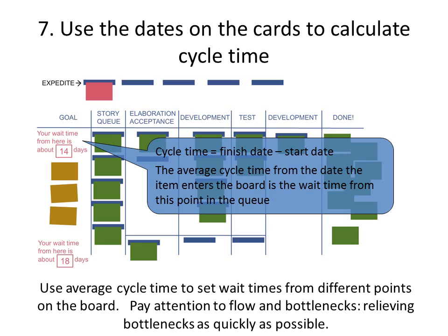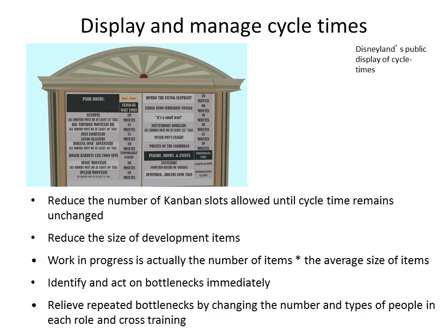Though sometimes it might be challenging with the different size items in the queue, focus is paid in Kanban to try to bring all the tasks to a similar size flow or similar size item, so the flow can be continuous and more or less uniform cycle time.